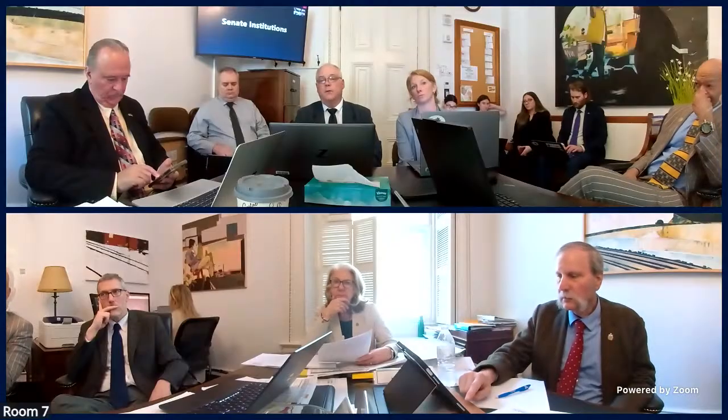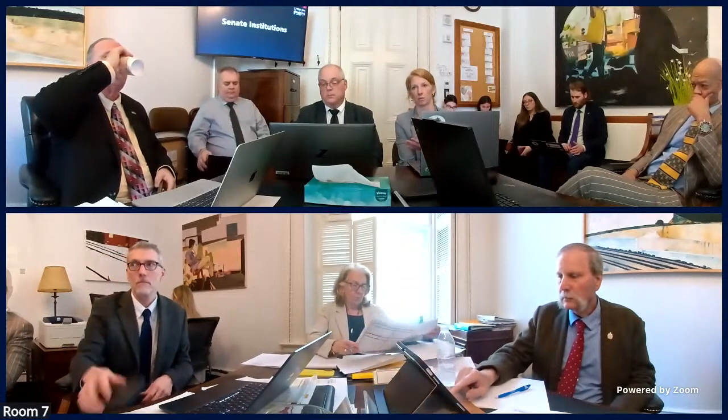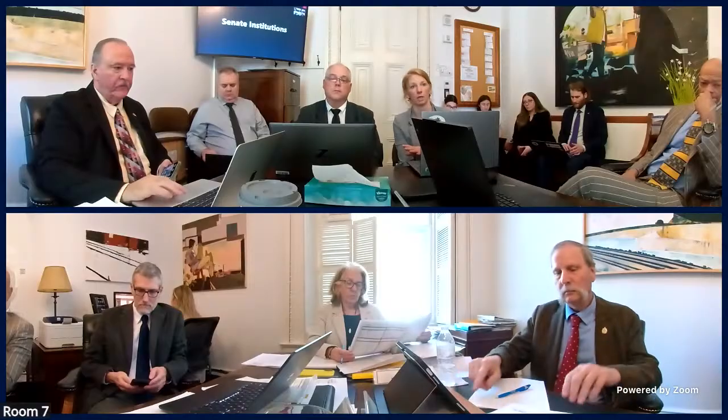We have been shaving the original estimate with 95% construction documents complete. The construction manager came to us with over $10 million for an estimate. So we've been shaving off $2 million right off the top to try and get it to our $8 million project cost. So with this additional $1 million, we're going to be greater in the hole going forward. And so the number, right, Joe, that you're talking about, we're going to receive as our guaranteed maximum price. Yes. Right, and so that's when we'll know with more specificity exactly what the total project cost is.